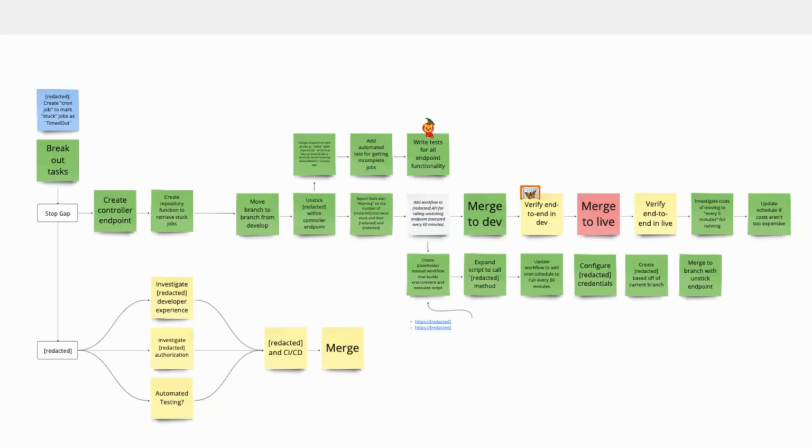Now, you can't read the user story in this screenshot, which is probably good unless you're on Zoom, because it's not very good. It's very technical. And this is a screenshot from a team that's still learning how to create product-focused user stories. Now, once the user stories have been defined, the team will brainstorm tasks. These can be tasks for anybody, UX design tasks, ops tasks, but most of them are going to be engineering tasks. Each one is meant to be 1 to 2 hours long, and they're written on a yellow sticky.